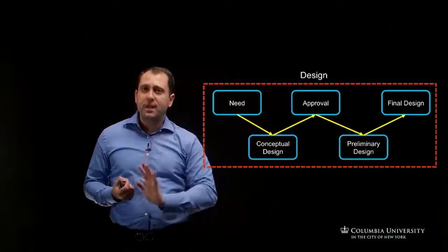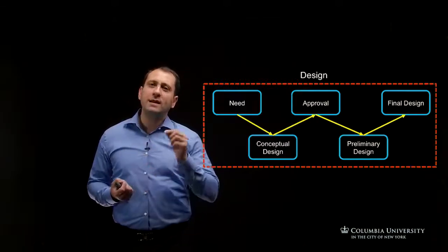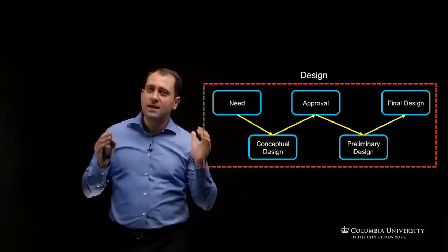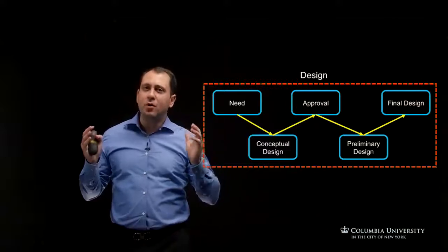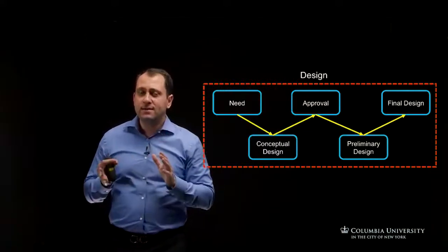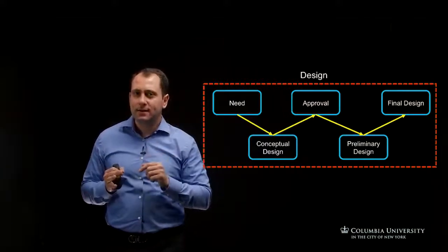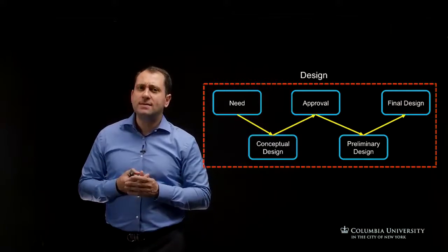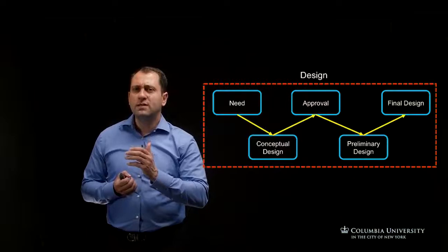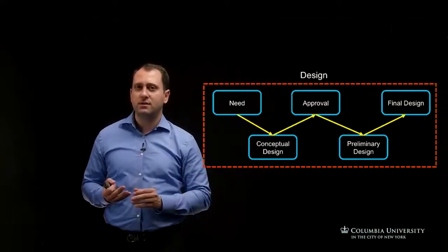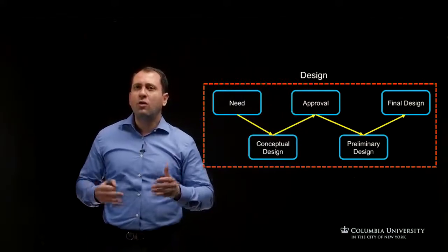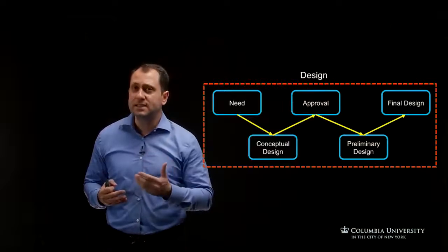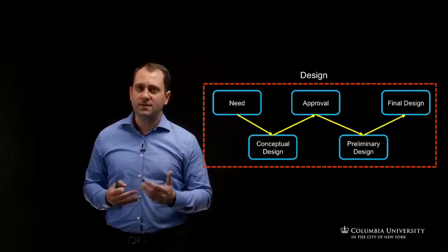Once the preliminary design is approved, the final or detailed design is accomplished, which is the second phase of developing what I call the set of plans and specifications that define the project to be constructed. In this phase, more detailed design is added. For example, interior finishes like walls, floors, ceiling, as well as details required to install any special items in that specific project. Last but not least, all the final and precise locations of the electrical, mechanical, or heating units, and even the structural systems are also finalized in this phase.